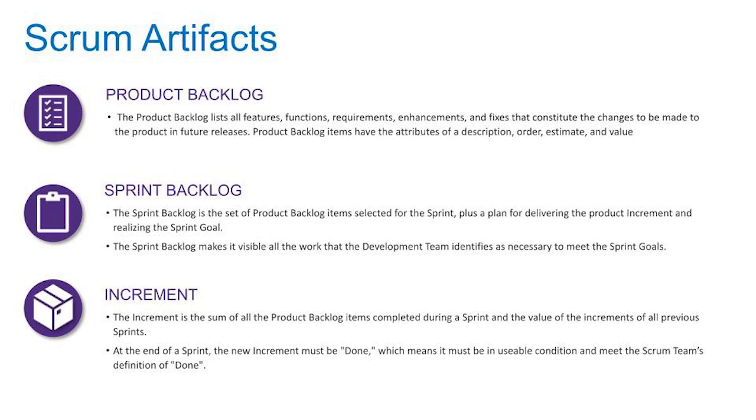Sprint goals is a common term that Agile teams work with, where they set a goal at the beginning of a set box of time and commit to it that they can actually get it done. So think of it this way: product backlog, high level, 10,000 foot view; sprint backlog, team level, less than a month view. And these are very important to keep updated and highly prioritized, but most importantly, transparent.